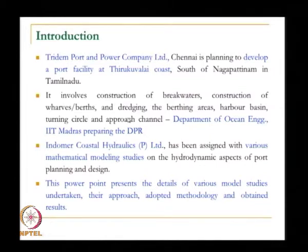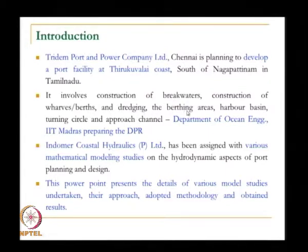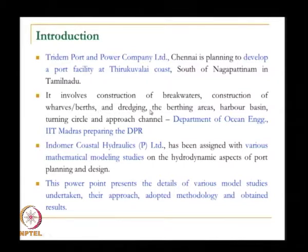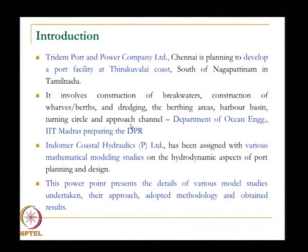The port requires breakwaters, berths, and dredging. The dredging is in the berthing areas, harbour basin, turning circle, and approach channel. All these things were prepared by the Department of Ocean Engineering. The design of breakwater, design of berths, methodology for dredging, disposal, and what is the berthing area, harbour basin area, turning circle area, and approach channel — everything comes under the detail project report. We also give the cost estimate.